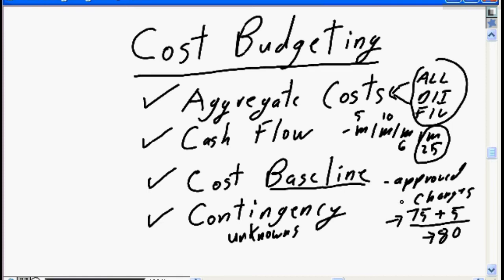If the project's expectation is $75,000, you need to have a reserve. You need to have contingency. How big that reserve is going to be, how large that contingency needs to be, will be covered in a future nugget called risk management, but you need to be aware that you need to have some incremental value on that contingency to address the unknowns. So let's assume going in, we say there's going to be a 10% contingency. So that means our budget isn't $75,000. It's $75,000 plus the contingency, and for round numbers, I'm going to say 10% is an additional $8,000. So your total project budget is $83,000, and that's excluding change. Change would increment that ongoing as the project is delivering.